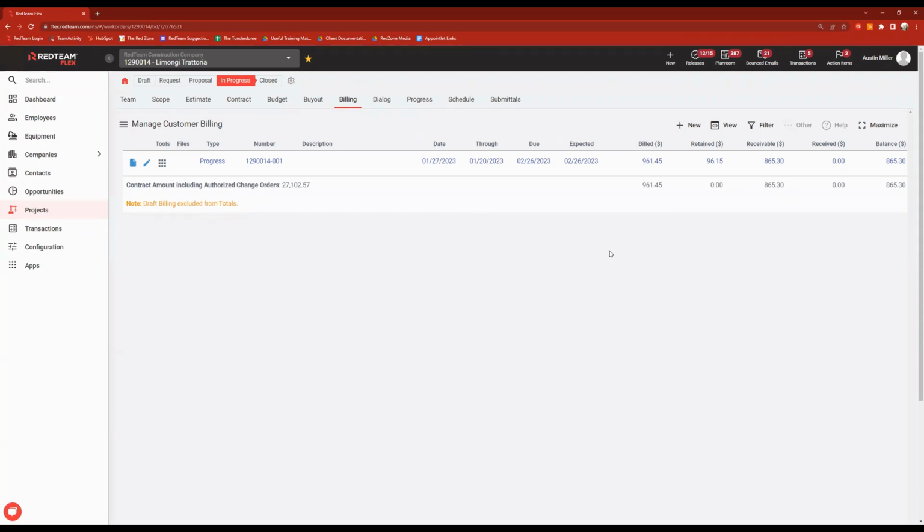I don't see any questions right now, Austin, but I did want to read out a definition from an earlier question. Rachel, when you asked what lien waivers are, we did get a good definition from Christina, who's our accounting specialist. She says a construction lien waiver is a legal document signed by a contractor, supplier, or any other entity contributing to the construction of a property, which states that they release the lien or claim on the property and they have received payment from the property owner for services rendered. So hopefully that gives you a little bit cleaner definition, but please drop in the Q&A if you still have any questions there.